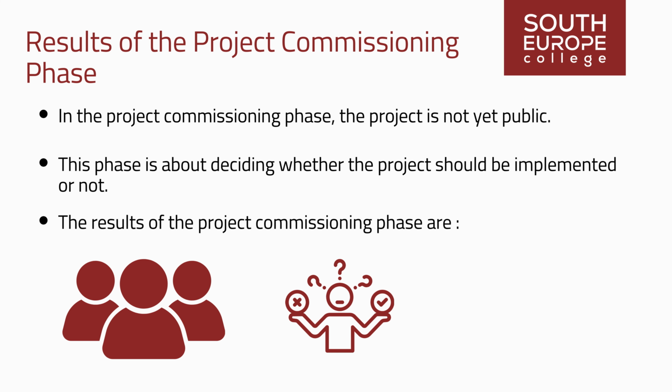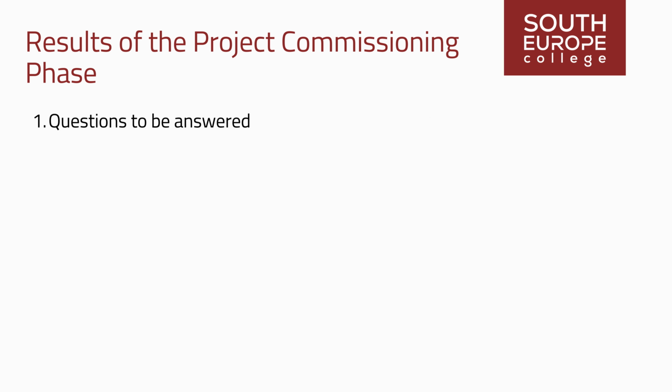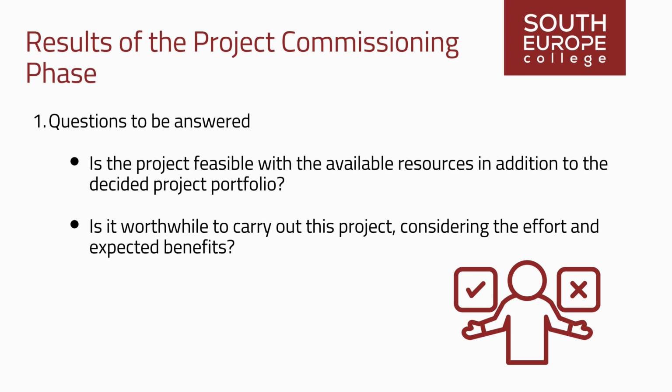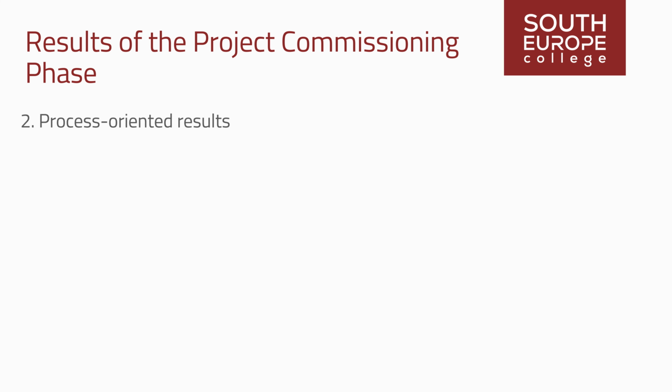The results of the project commissioning phase are questions to be answered. Is the project feasible with the available resources in addition to the decided project portfolio? Is it worthwhile to carry out this project, considering the effort and expected benefits?